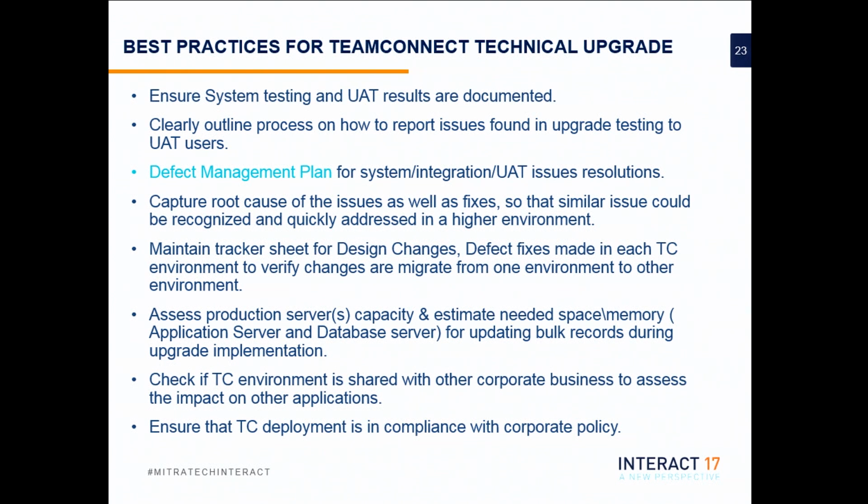And it's really important to keep track of what caused an issue and what the fix was. So when the system is implemented in a higher environment, you have this all handy, and you don't have to go back and reinvestigate the exact same issue that happened before in your lower environment. It's going to save a tremendous amount of time for everybody if this is handled and tracked carefully.